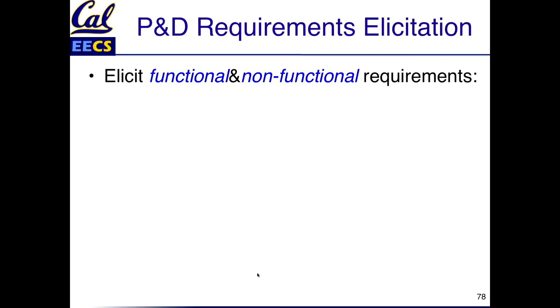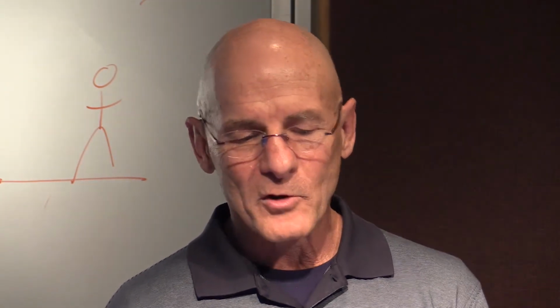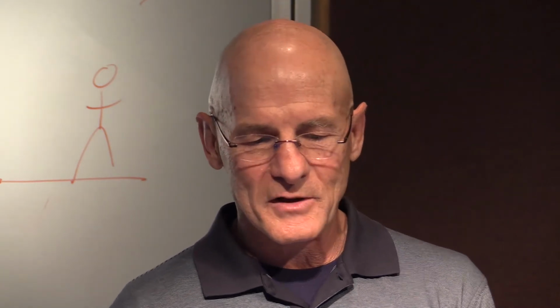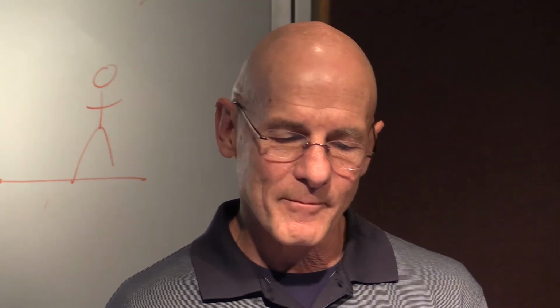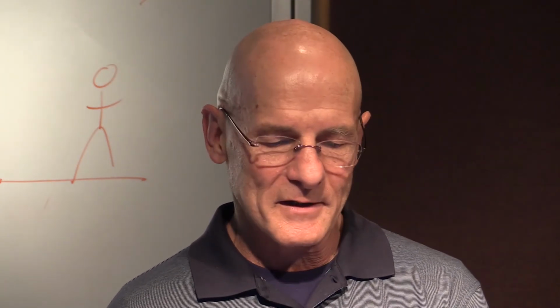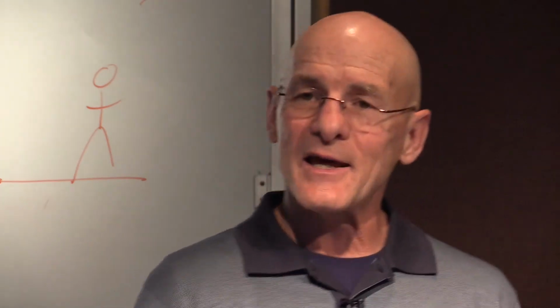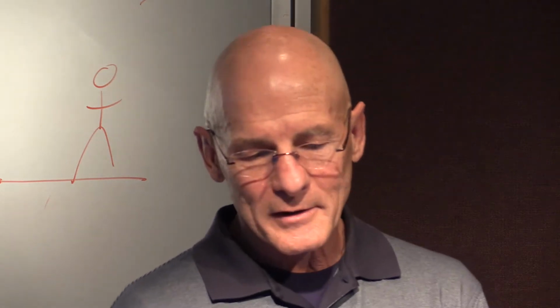So you're looking for both what are called functional and non-functional requirements. Functional is like we've seen, right? Add a movie to Rotten Potatoes. Non-functional is a kind of weird word, but it's about performance. It's not features; it should be called non-feature, right? Non-functional means 99% response time of less than a second, or four nines of dependability. So how do you elicit those things? Again, that has to come from the customer, and so it's pretty much the project manager primarily doing this.